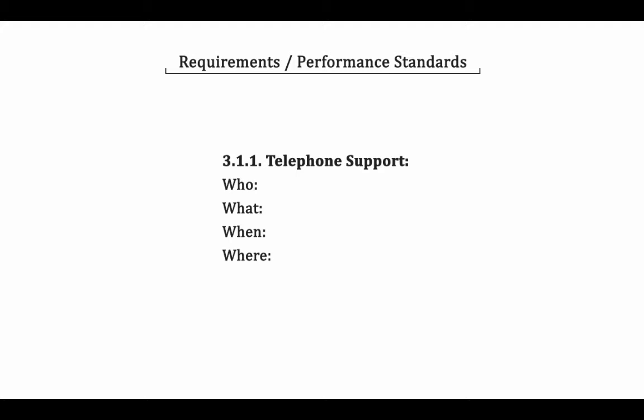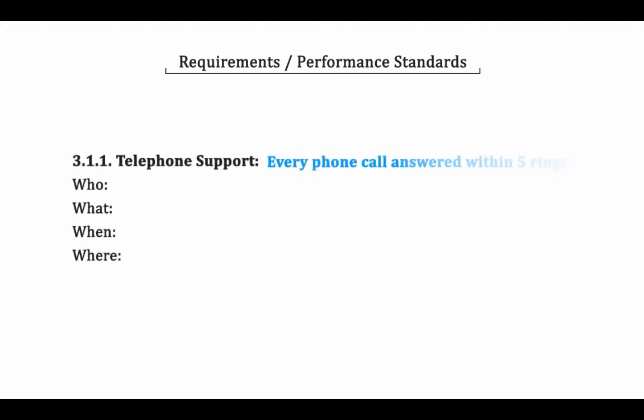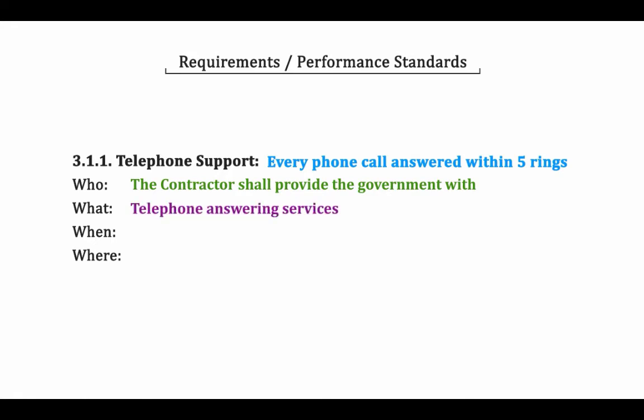First, we add our performance standard. Every phone call answered within 5 rings. Then, we have the who. The contractor shall provide the government with. What? Telephone answering services. When? 24 hours a day, 7 days a week except federal holidays.